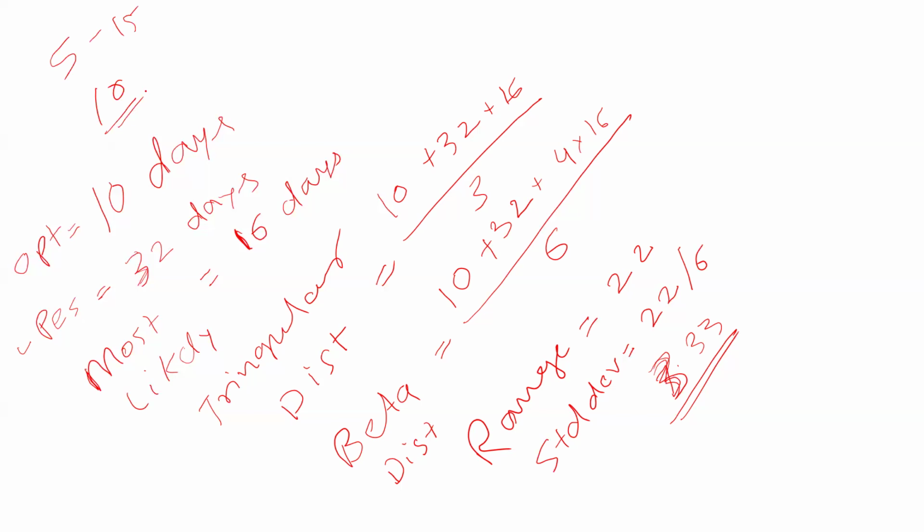Correct, Kuldeep? Now there is another guy. And when he says 10, in the past you have always seen it is always 8 to 12. If he says I will do it in 10 days, he will do it in 8 days or max 12 days. This guy will take 5 days or 15 days. Correct, Kuldeep? Okay. Now what happens next time when you ask them for a number? This guy went ahead and said, whatever, 10 days. And this guy this time said 11 days. Kuldeep, you would realize that sometimes relying on this 11 is safer than this 10.